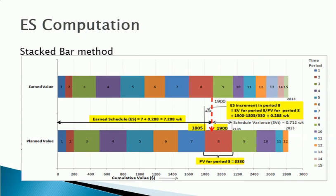The value of time-based schedule variance can be easily calculated as the number of the status period (8) minus the value of Earned Schedule (7.29). So, the time-based schedule variance is approximately 0.71 weeks.